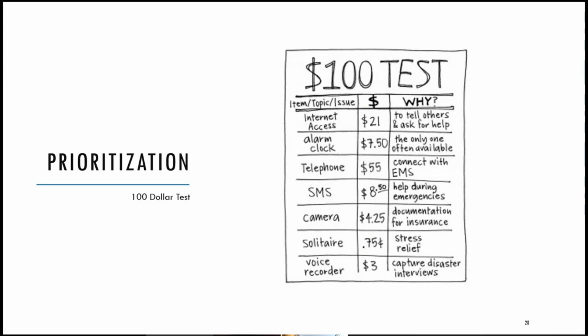Maybe some requirements touch 3 different departments, but it's then important not because the requirement itself is so important, but because it's important for a lot of departments. Maybe another one is high in value because it's for one department such a big thing. This method is also good if you want to integrate the stakeholders and users more into the prioritization process. Because the last one I talked about, you do as a requirements engineer with the information you got from the stakeholders, but you make this prioritization. Somebody has to validate them from the customer side. Here, the customer itself makes those prioritizations, the users themselves. So it's a good way